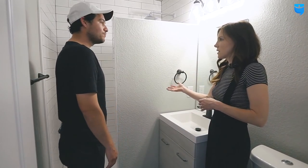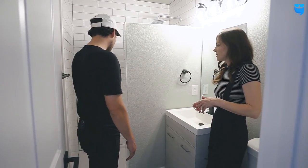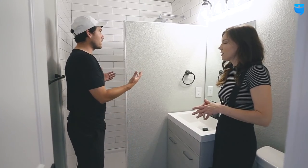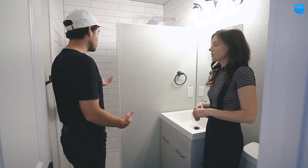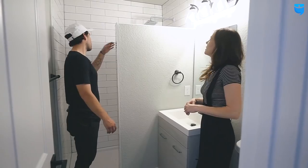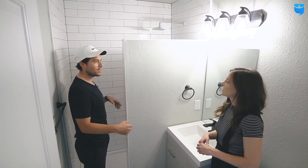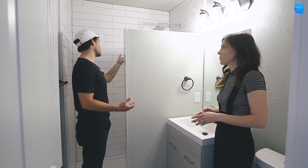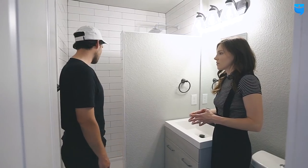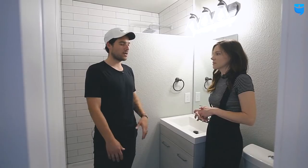That's right. I'm definitely noticing here that there's not a glass shower door. Can you touch a little bit on that? That's an interesting observation. What we found when we were doing this, because we couldn't really move any walls, was that we would save roughly $1,000 per unit by not having to do shower doors, because these would be custom. So we did a waterfall shower head, where the water just comes straight down, and it added to the industrial feel that we're trying to get, since it's a higher end, trendier neighborhood. We were able to accomplish the aesthetic we wanted and also save money on custom shower doors. And when you have 23 units, $1,000 per unit is a good size. Yeah, so we're able to show that to our investors. These are the little ways we're able to save money.